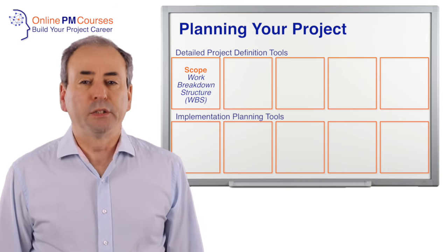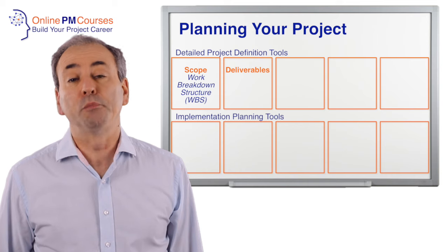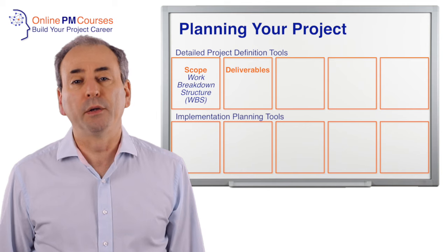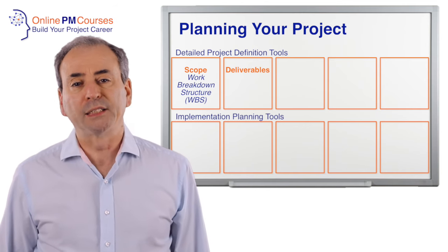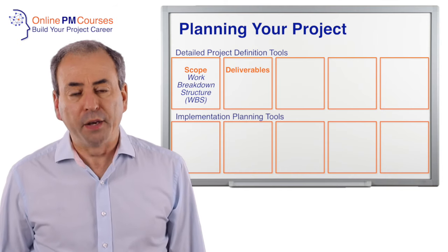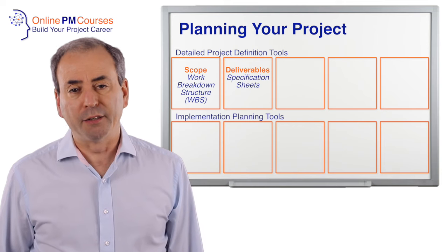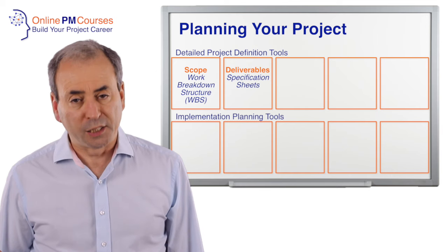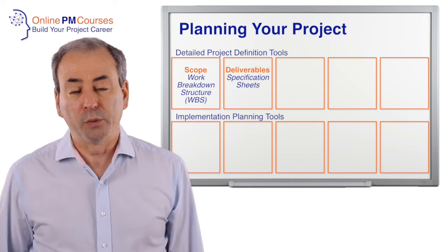The second element of our project plan has to address the deliverables or products that we're going to produce as a result of our project. Two things make up this component: first, a schedule of all of those deliverables, often reconciled to your work breakdown structure; and second, a series of specification sheets. For each deliverable there needs to be a specification documenting the functionality, the quality standards, and the regulated requirements to which it needs to conform.